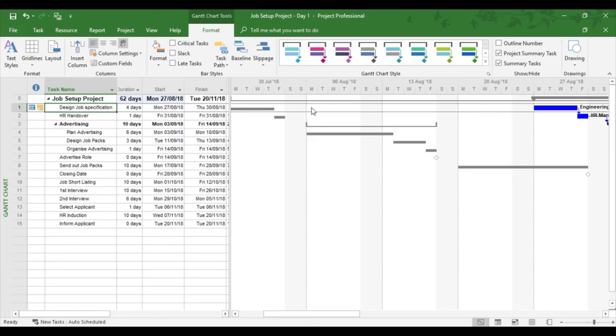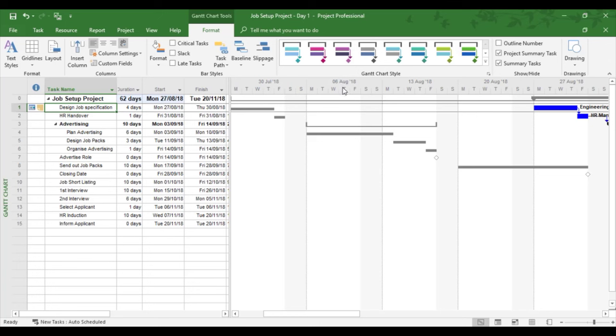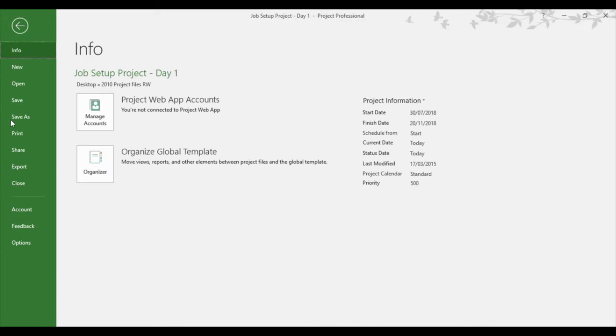If I look at the print of this with the default settings, the default settings for the time scale of Microsoft Project is days for the bottom tier and weeks for the middle tier. This is what controls the printing settings within Microsoft Project.